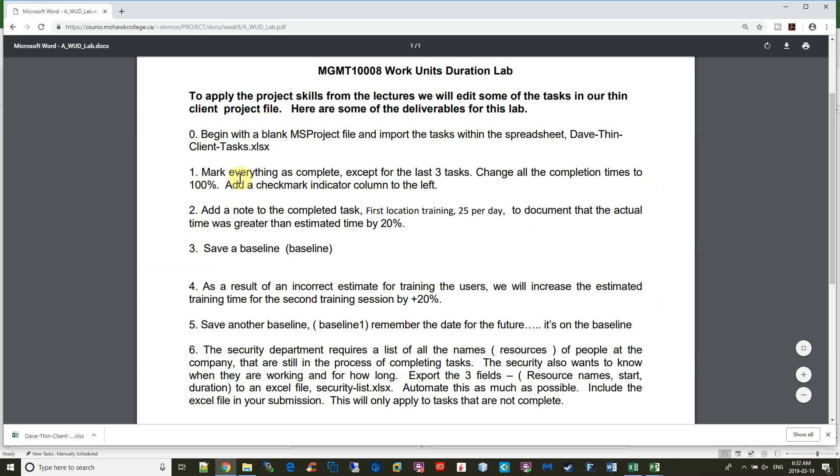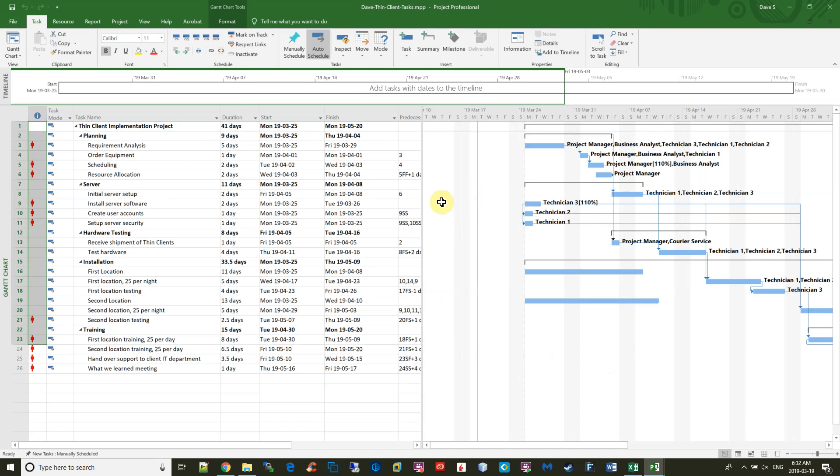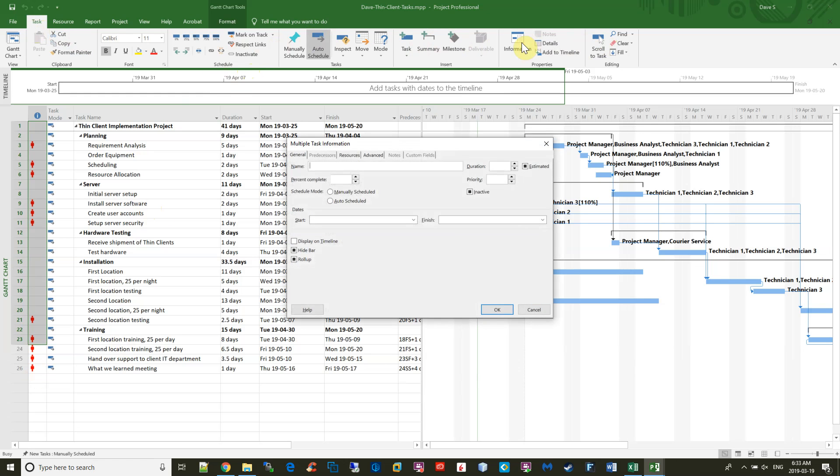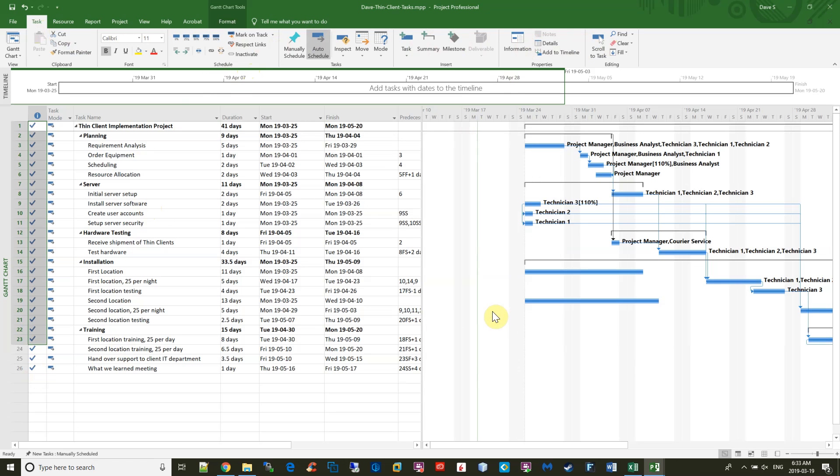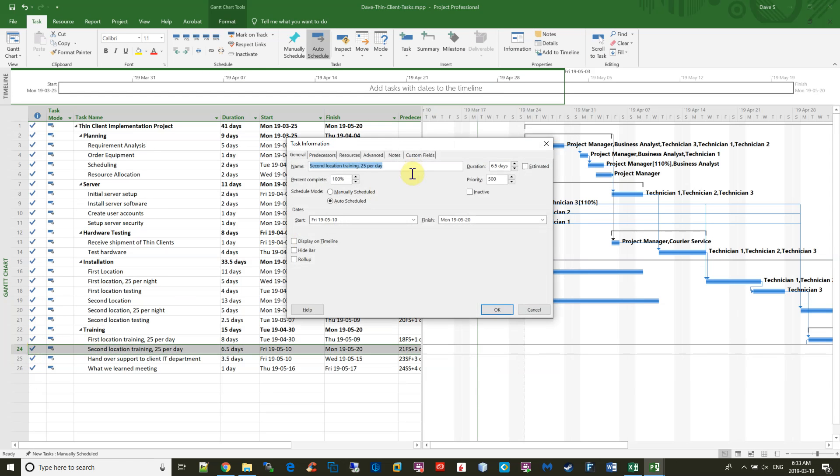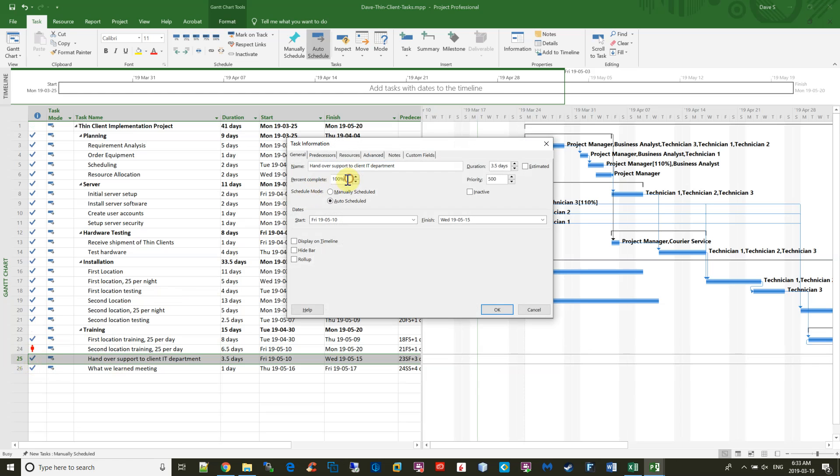The next step is to mark everything complete except for the last three items. So to do that, I already have the Indicator column, which is the checkmark column on the far left, that was already there by default. So I'm just going to highlight all the items that I want to mark complete except for the last three. And the best way to do that is to go to the Tasks tab and hit Information, and then just change this to 100%. Now you see the last three items shouldn't have got changed, so I'll just change those back manually by double-clicking and putting a zero in the Complete column.